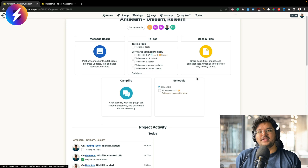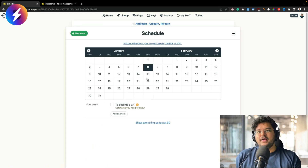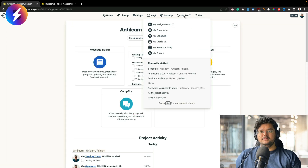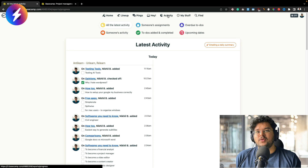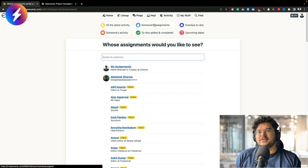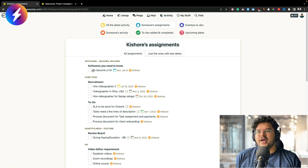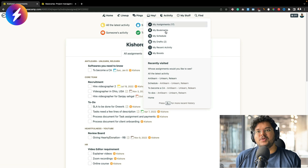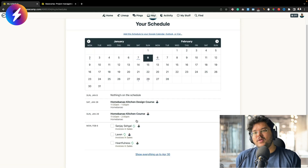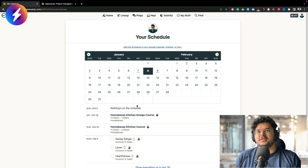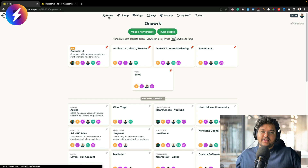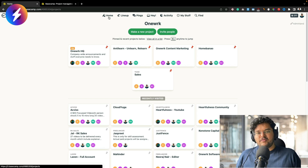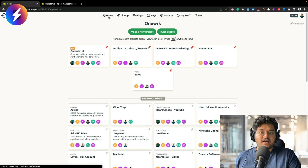The second part: as and when I assign something, it gets updated in the project schedule, but it also gets updated in that particular person's schedule. For example, if I go to Activity and open someone's assignment for Kishore, automatically this task is assigned to his calendar. When he opens My Stuff and his schedule, he can see all tasks assigned to him across different projects. This kind of interlinking is really well thought out in Basecamp — it's not always as easy to access in other softwares.